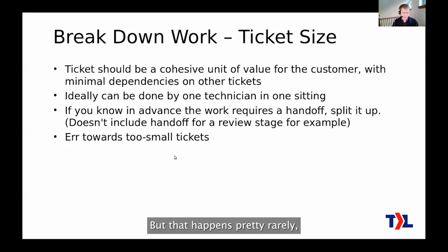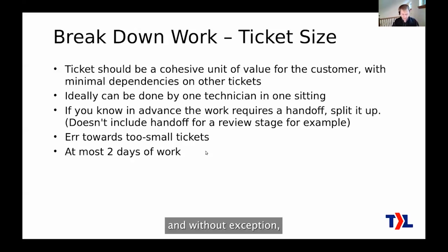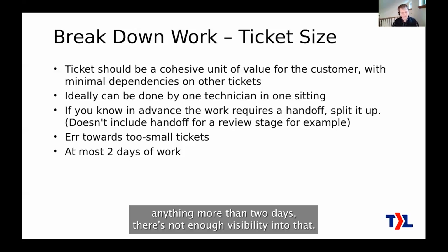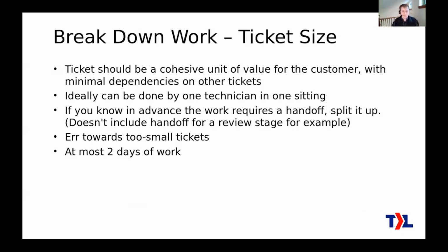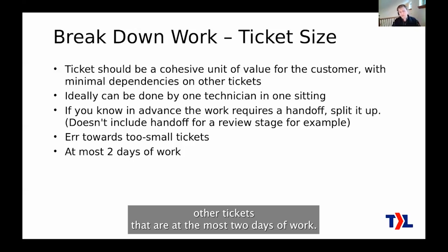But that happens pretty rarely, and without exception, I should say almost without exception, make it at the most 2 days of work. Anything more than 2 days, there's not enough visibility into that. You ought to be able to break that sort of ticket up into other tickets that are at the most 2 days of work.